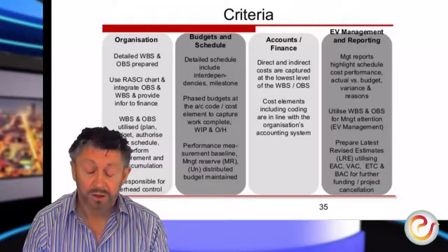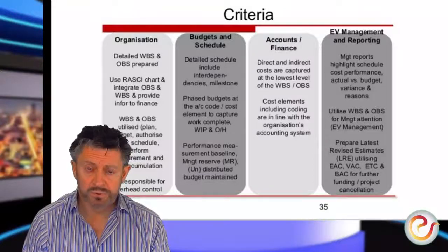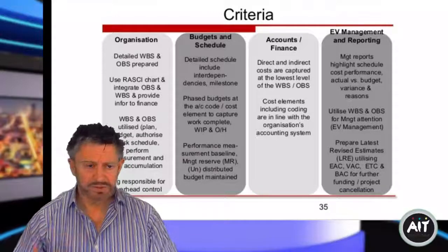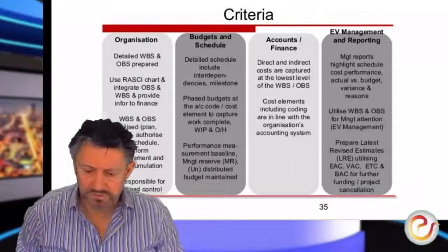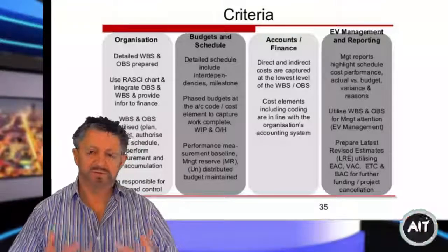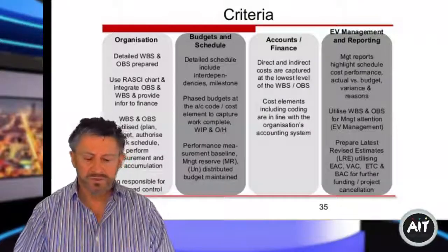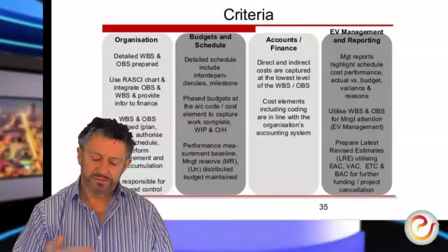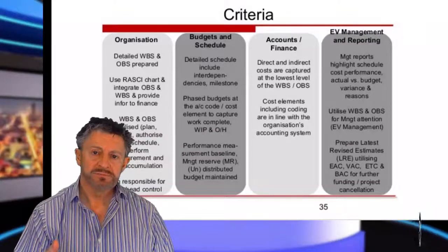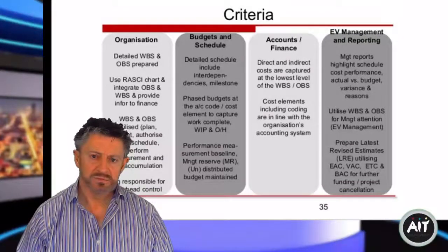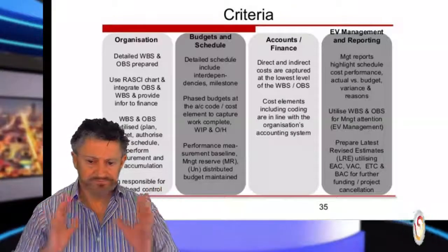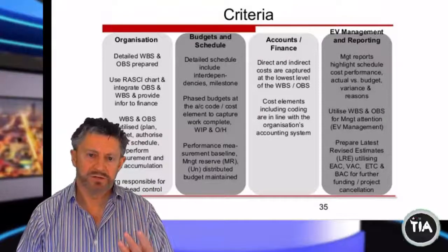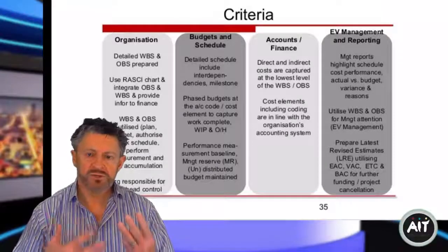So when we were producing our project status reports, and we gathered all the data as a project manager, we went and talked to our team and said, is everyone happy or not, and this is the current state of the project. We produced these graphs so we could see any variance, and then we gave 3 major items and 3 minor items. We didn't write big long reports. We said, these are the 3 critical items that we need to look at to bring it back online, and these are 3 minor.